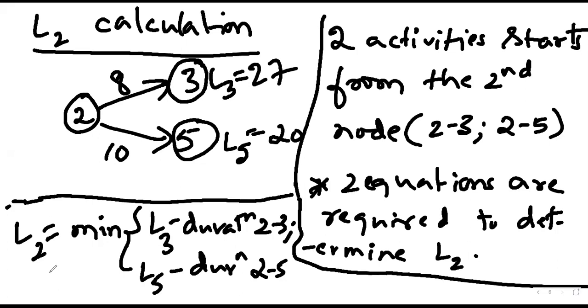0. And one of the ways to ensure whether the answers obtained in the final exam are right or not is to see whether L1 is equal to 0. Whatever the case, L1 should be equal to 0. That means you have done all the calculations right.